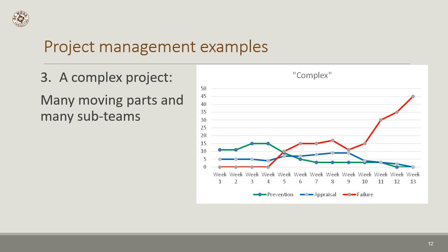One of the things that you'll find when you collect data on a number of projects is that there's going to be a varying dollar cost up and down, and there's going to be a varying number of weeks left to right. So multiple projects are going to have to be normalized to bring them back to the same scale, left and right and up and down. Then you can do curve fitting analysis to determine what is a normal situation for these various types of projects. This normal curve gives you a standard to shoot for when you run new projects.